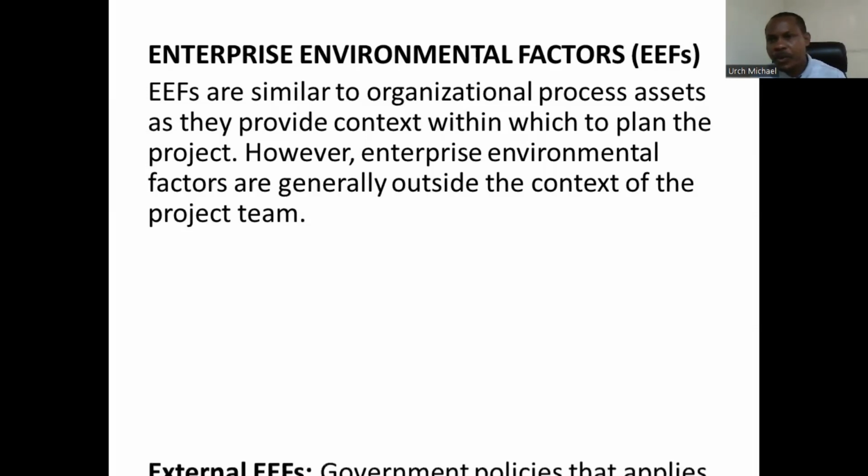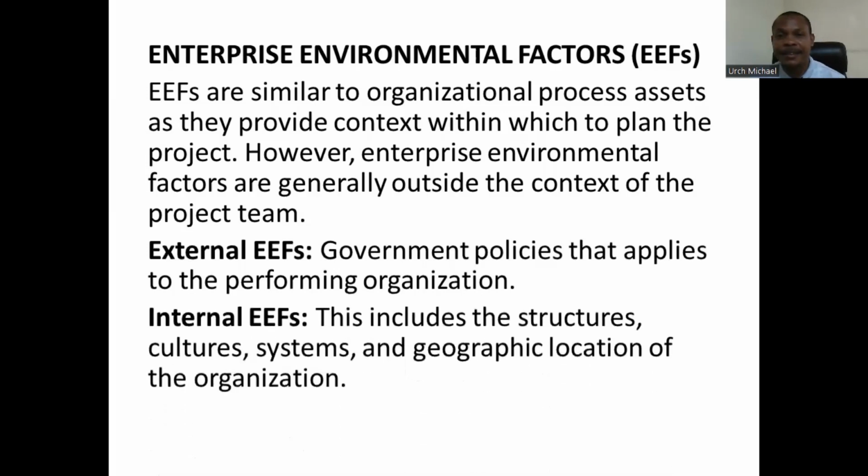So in the EEF, we have the internal and external EEF. When we talk about government policy that applies to the performing organization, that is the external EEF. When I say government policy, I talk about development policy and many other things, public holidays, for instance. If you have public holidays and you have made your schedule in your project, definitely it will affect one of the days. So you have to consider that as well. If there are public holidays, you have to factor that into your project scheduling. If there's crisis, you also have to consider that. Economic issues in the country, you have to put that into consideration.